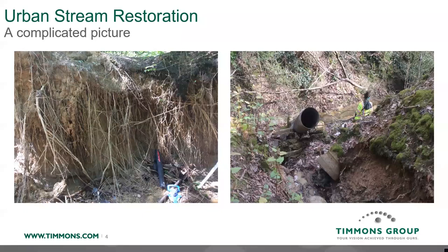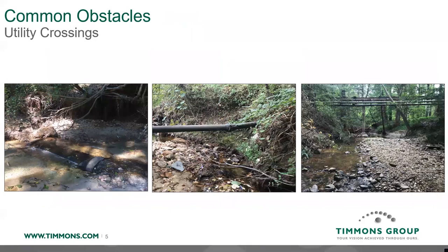Thanks, Alex. I'm going to start really big picture. A lot of what we deal with in urban stream restoration involves many constraints found on site. We see a lot of utility crossings — sewer, electric, cable, anything. You can see a sewer line crossing through the bed of the stream, some sewer lines suspended above the stream due to erosion over time, and even some utilities constructed to be suspended about 10 feet above the stream center. Lots of interesting things with utility crossings.